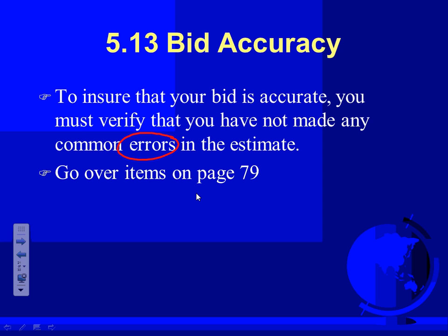So, assuming standard devices, if you assume that you're going to have a residential type receptacle, a residential type receptacle is 33 cents, so maybe a buck. This one is $3. Would that make a difference? So assuming standard devices, that's a mistake. When you assume you're going to have a standard receptacle versus big receptacles, those are more expensive. In commercial industrial, it's all spec. MC cable versus AC cable, NM cable, all these you have to take into consideration.